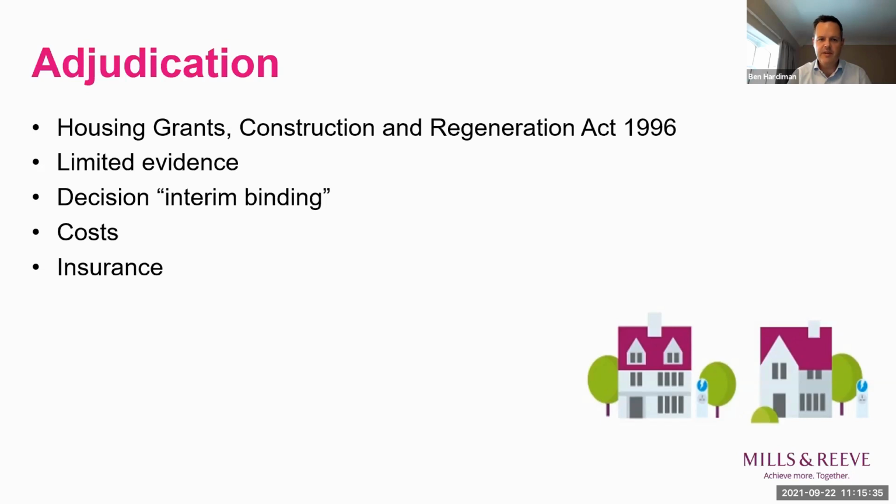Adjudication decisions have to be enforced by the Technology and Construction Court, but since the court upholds the vast majority of adjudication decisions, challenges are rare, and so the majority are just simply accepted. And what are the benefits of using adjudication, Ben?